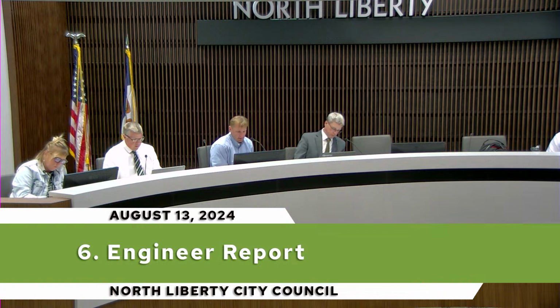Fox Run Pond Trail improvements. All the new trail has been poured. There's going to be a new playground that Guy's crew are going to help put in and coordinate. The border around that is completed. So aside from that playground work, there's a bit of site cleanup, grading, and then seeding on that project to follow up this fall.